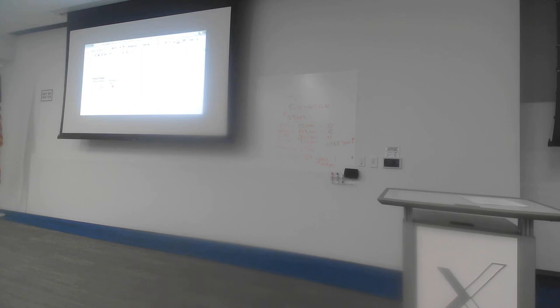And the normal duration that we had was 20 days. And again, that is just a sum of all the different activity durations of the activities that are on the critical path. But as you'll see when we go forward in the example, we have to keep track of all of the different paths in the project, not just the critical path. So I have to pick out all of the other different paths in my project as well, and again, add up all the durations of those paths.